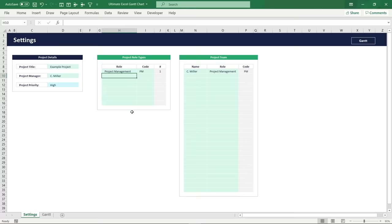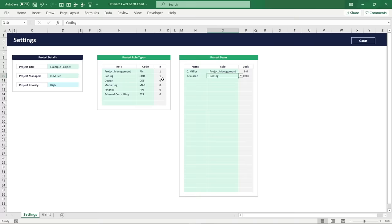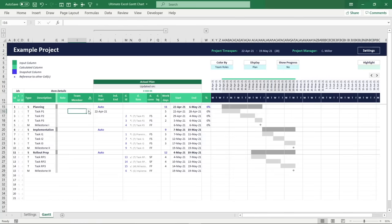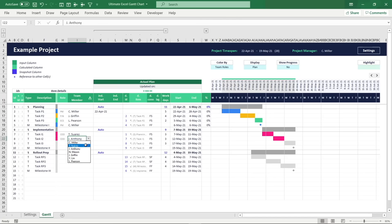To add new roles to the project, you only need to enter the role name and provide a shortcode. You can then add new team members and assign any of the roles you have defined. The assignment of roles is automatically tracked in the count column. Once you've added your team members, you can jump back to the Gantt worksheet and assign any defined team member to your tasks and milestones. The respective role is then automatically displayed and visualized with its own individual color in the Gantt chart. A team member can easily be replaced by another of the same role without any visual disruption.